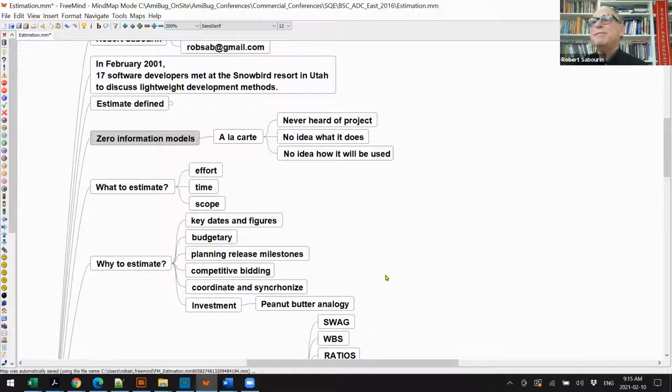And when someone asks me to estimate something I've never heard of, I basically try to turn it into a question of, well, first of all, why are you asking? And very often it's because there's a new project on the horizon that they don't know much about, but they want to get a sense of before they start. So I ask them, okay, I don't know what that project is, but let's talk. Has there been something similar done in the past? I look at projects in the past, and I say, okay, can we identify a similar past project that we did in the last few months or the last year, something in the recent past?